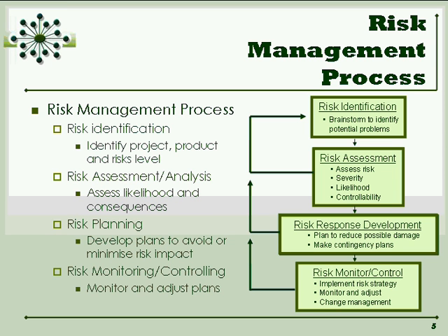So again, as we talked about, the first thing to do is risk identification. My personal preference here is to get the whole team together and do a brainstorming session to talk through all the aspects of where the protocol might be at risk, where the site may be at risk. And this adds value in a lot of different ways. Everybody looks at the protocol differently. The CTP staff look at the protocol differently than the research staff. The RA looks at the protocol differently than the principal investigator would. Everybody's input is really valuable.